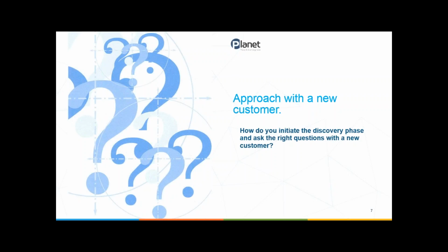From there, once we have a good idea of what's in their environment, we'll create a deployment methodology. And this is again determining that holistic view of their environment. More around, do they need to be upgraded based off department? Do they have 24/7 shops where they can only be upgraded during a certain time? What are their maintenance windows that are associated with this? Once we understand how we're going to deploy it, who's going to be affected, what limitations and constraints we have within the environment from a deployment perspective, then we'll actually get into the technical portion of this.